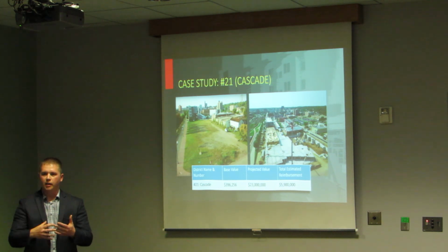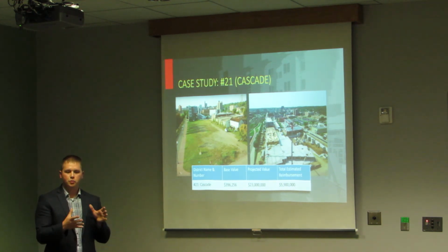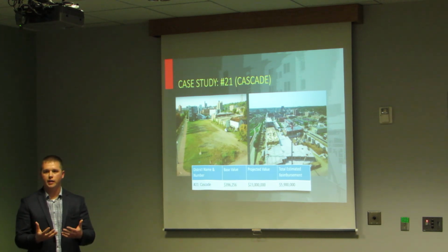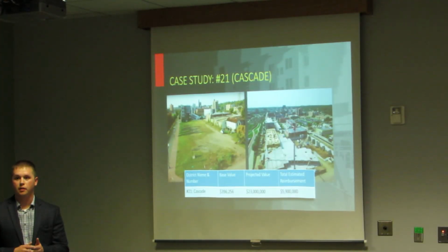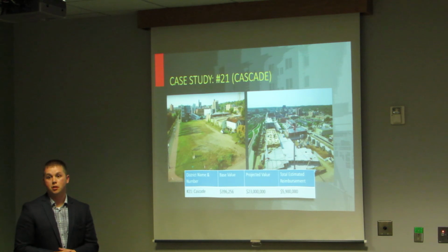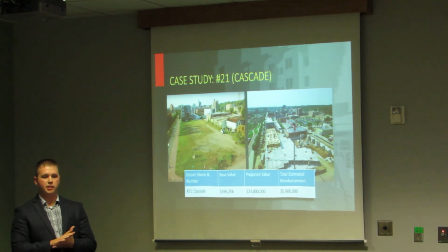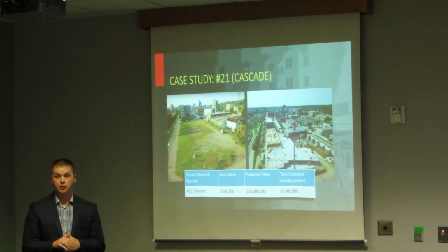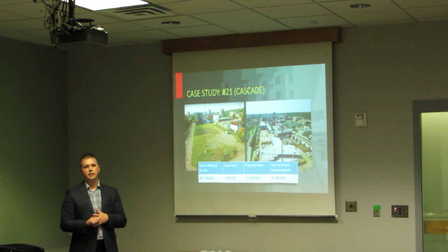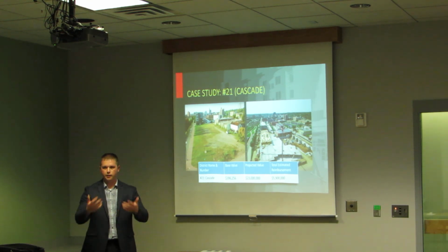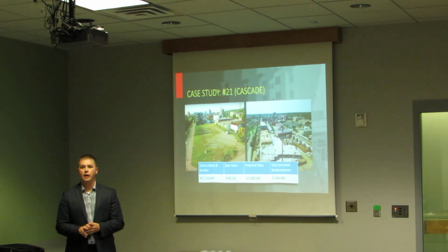They may come in a little less, but we've committed them to making sure, especially when we're selling property, that we're getting what they said they were going to give us, because we did go through that public process. When a TIF is factored into that, sometimes there are conditions related to the overall project too, and a timeline for when they have to construct it. On some of those, when it comes to city property, we've identified a start date and typically a date of finish. We have the flexibility to grant an extension if we know they're working on it, but we do have outlined timelines in a lot of those developments related to city property.